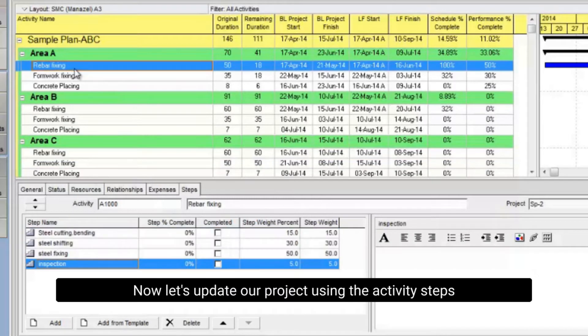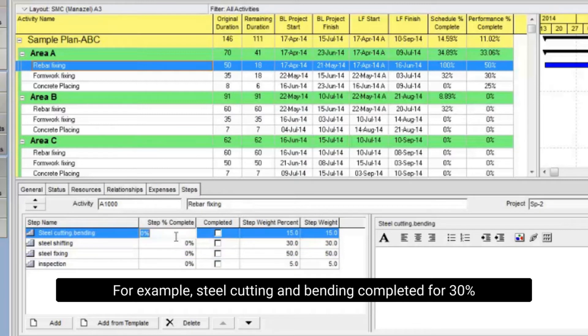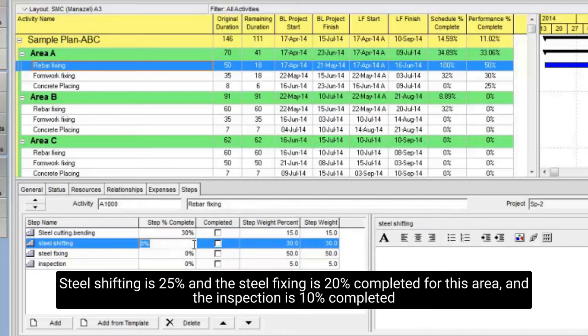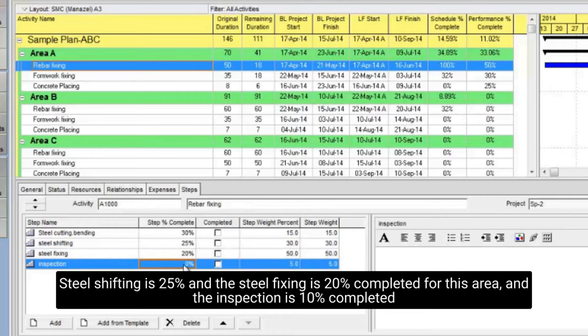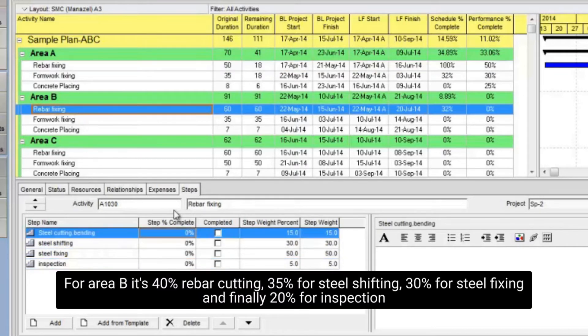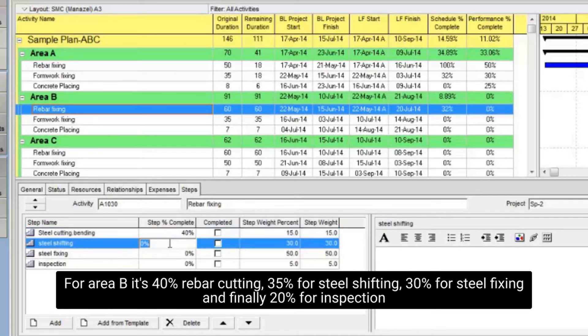Now let's update our project using the activity steps. For example, steel cutting and bending completed for 30%, steel shifting is 25%, and the steel fixing is 20% completed for this area, and the inspection is 10% completed. For area B it's 40% rebar cutting, 35% for steel shifting, 30% for steel fixing and finally 20% for inspection.